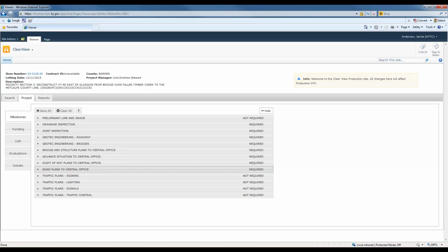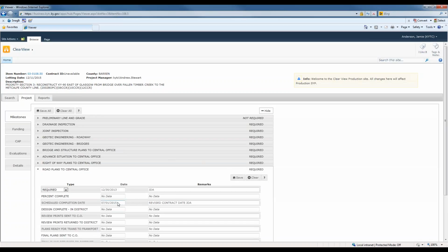So for example, let's look at the road plans to central office. We received a consultant monthly report, and in this report the consultant has said that these plans are not going to be sent in until September 1st. So let's try to update this date. It's currently set for July 1st. The consultant has said that it's not going to be submitted until September 1st.